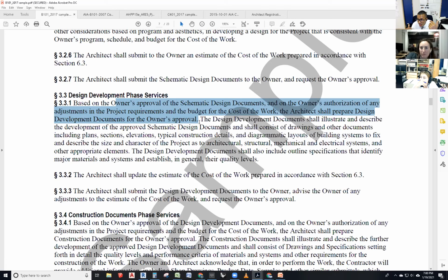Yes, we do. Absolutely. We're meeting their budget. It's working. They're adding more scope. That changes our initial information. Remember, our initial information includes the program, and the program would have included a helipad if they wanted it. So now they're adding it. So we gotta be adjusting our scope of services and our fee accordingly.